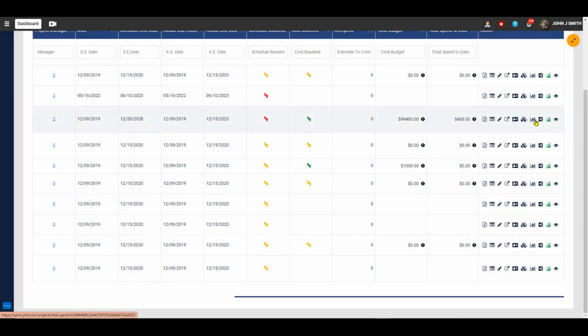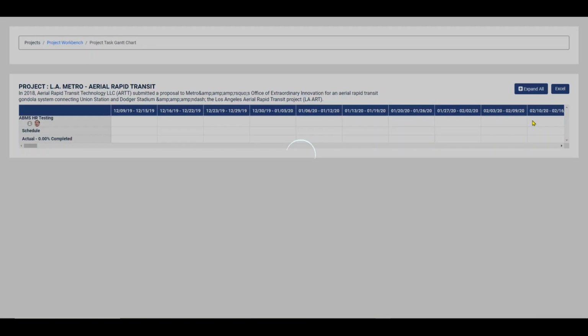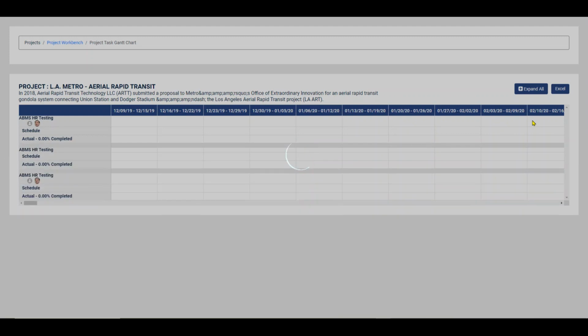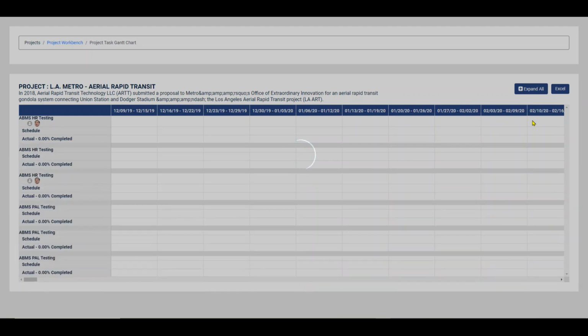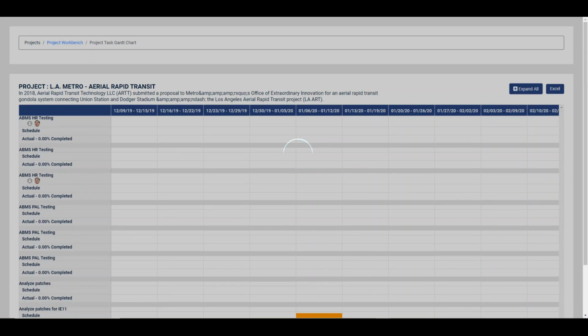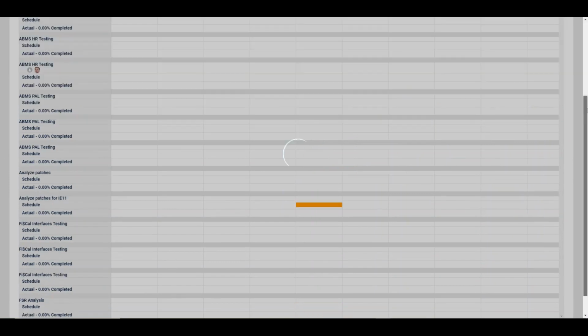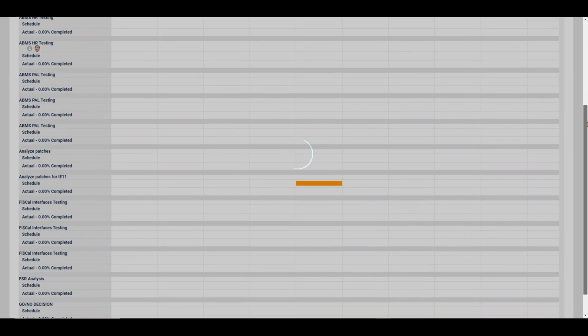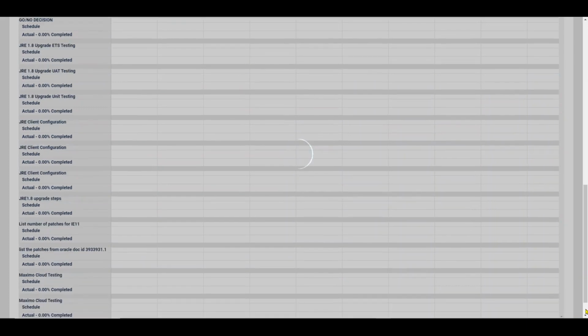You can generate the project Gantt chart in the next page, where each project Gantt chart section contains actual v/s planned hours. The Gantt chart arranges date-wise planned v/s actual analysis for each task. Project Manager can analyze the planned v/s actual timeline for each task using the Gantt chart page. You can also export this Gantt chart page content to Microsoft Excel. The Gantt chart is the graphical presentation of the actual versus planned view of your tasks and is for information purpose only. Next icon is Performance Analytics tab.